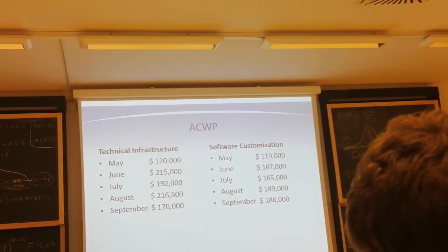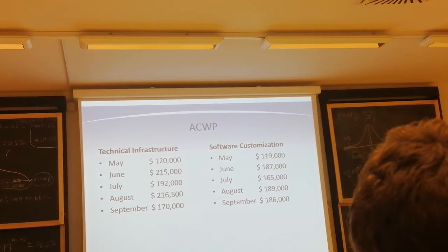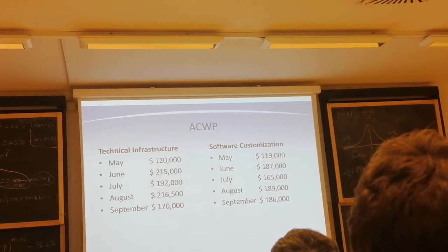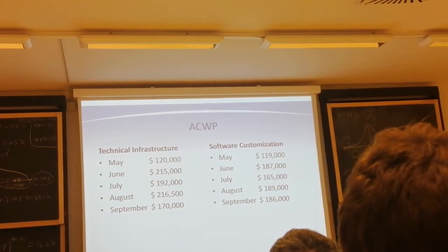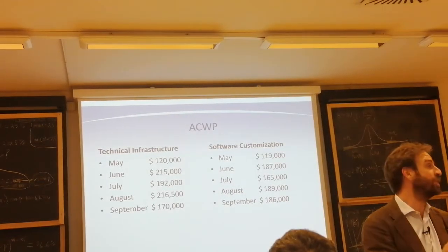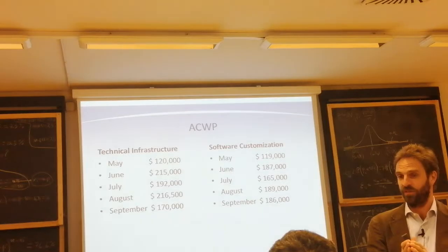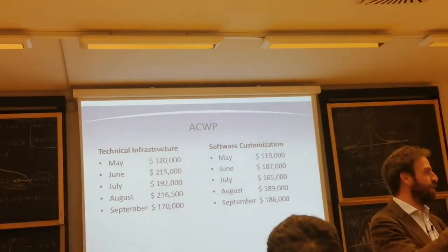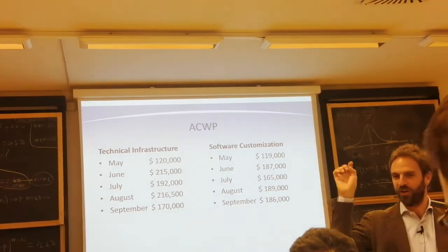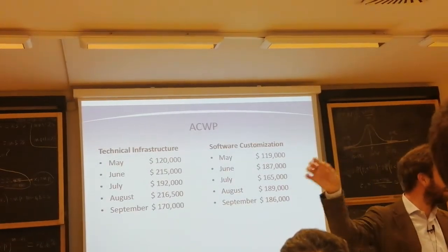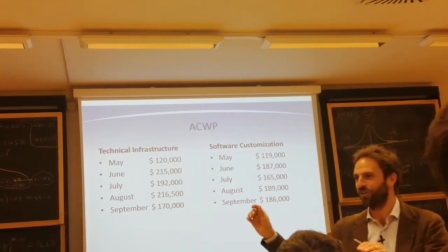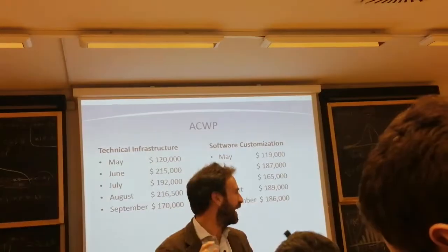But in fact, yes, because this cost data is just human resource data. So behind those costs is time spent, person hours spent, times the unit cost per hour, the standard rate. Think about Microsoft Project, you enter the work hours, then in the resource sheet you have systemist, 50 euros an hour, then you add a developer or a programmer, 40 euros an hour, you multiply and you get those data.